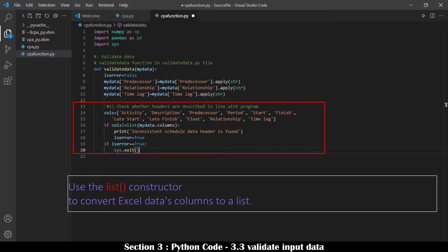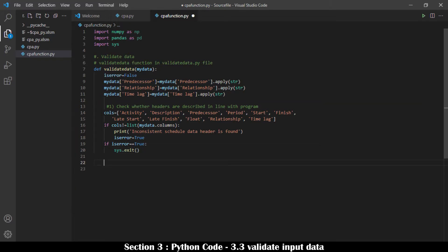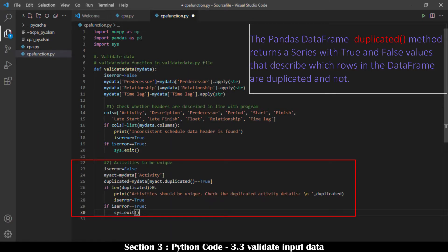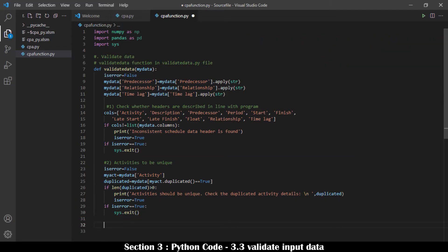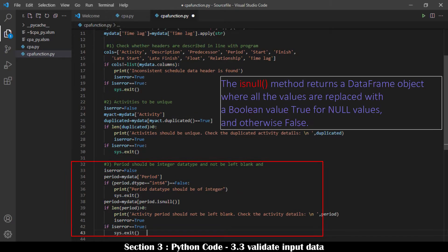Activity IDs should be unique. Pandas DataFrame's duplicated method is used to find which activity is defined more than once. If a duplicated activity is found, it is highlighted and the file run is stopped so the activity ID can be made unique. Activities' period data should not be left blank. Blank cells for period are found using the isNull method. If there are activities whose periods are not specified, the file run is stopped and periods must be entered before re-running.